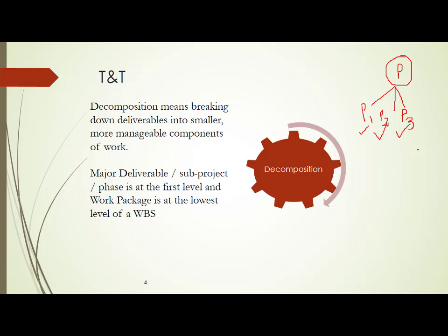The third problem is I have to dig. Now for leveling the ground, I have some set of resources. Probably you may have to get a bulldozer and level the ground. So you have a separate set of resources for digging, and a separate set of resources for marking, and after marking you have to lay the foundation. So this concept is called decomposition.